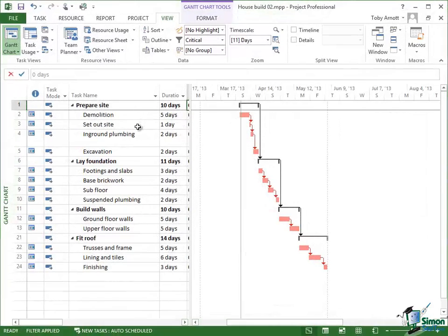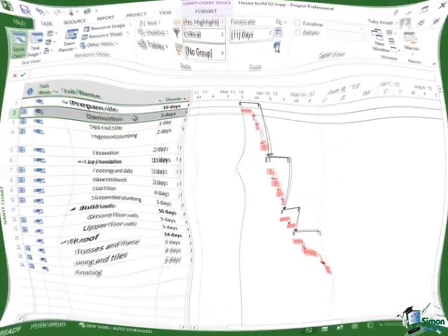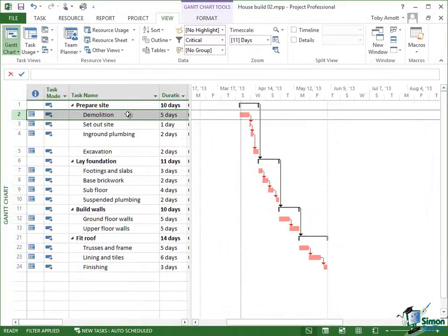So we've got making the tasks shorter, and we've got overlapping the tasks. Now when we talk about making tasks shorter, it isn't only about reducing the amount of work. It's often more about reducing the elapsed time for tasks. So it might be 5 days work, but could we do 5 days work in 3 days? And then we look at options like, what about working overtime? So in each of these situations there are very practical considerations, and there's usually at least 2 or 3 different approaches to achieve a specific objective.